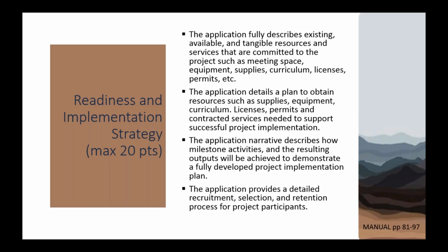For any project that is recruiting participants, the application should detail how people will be recruited, selected, and the plan to keep them participating in your project. Incentives are an option, but they should be appropriate to the age groups participating and should follow the cost principles as to their use. Not all projects will need participants in a recruitment plan. If this is the case, I would state this in your narrative so that the reviewers do not mistakenly think that you missed it in your application.